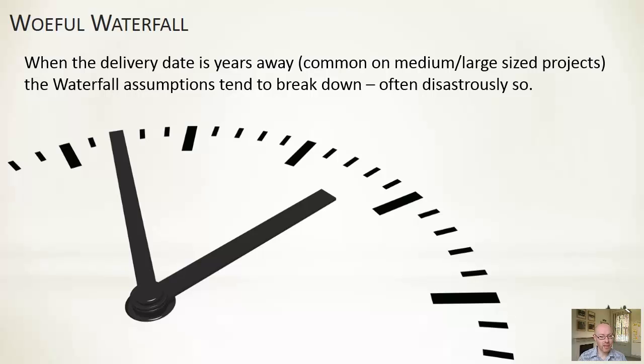That means that I'm going to find it remarkably difficult to be precise about what I require up front. And because then we're looking at a lot of features that need to be captured and recorded, the documentation will be large. So Waterfall doesn't particularly lend itself to large, distant projects, or rather the assumptions that it makes are more likely to fall down then. It's not a necessary outcome, but it's quite a likely outcome.